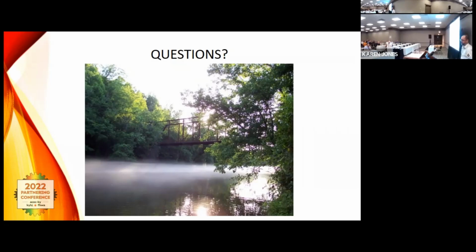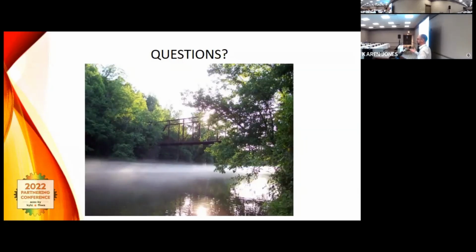That's great advice. John's right. I feel like I've had those type of meetings with John and his group more. I don't know if that's District 12's availability and being upfront, or you all have more challenges because of topography and sensitive streams, but there are absolutely projects where asking more questions up front, digging into the construction flows, helps, because John and I don't know exactly how a contractor would choose to do this. Pull 3 contractors in a room, they might get 3 different answers. We have to only permit it one way. And permitting it the wrong way could drive up bid costs. I mean, there's a lot that needs to be involved, and having early involvement with your project managers, going and knocking on the door of the construction guys and bringing them in during the design and permitting phase sometimes really helps. So thanks for bringing that up.